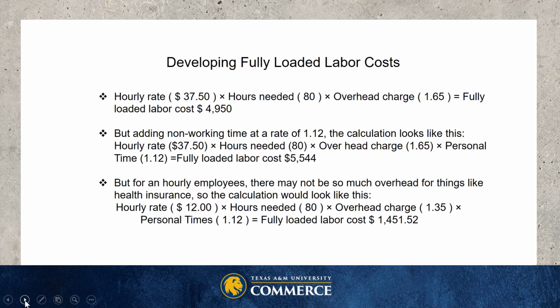We want to do fully loaded labor costs, and this is one of your assignments. There's more that goes into figuring the labor costs than just the hourly rate. So we can have an hourly rate of a full-time programmer of $37.50 an hour.